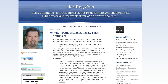I started looking at three-point estimates — something I've done before — and I've also done something a little different where I take a probability distribution and apply it to the estimates. I've used a routine category, a medium uncertainty category, and something brand new that we've never done before — three buckets.